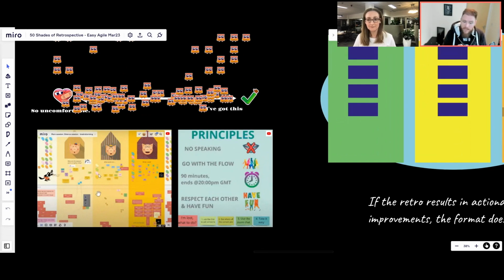Now, you can interact still. It doesn't mean that you can't get to the outcome of a retrospective. You can put Post-it notes on this board, and if you have a question, you might put it next to that Post-it note in a different color, asking for clarification. What I'm emphasizing here is that you can try embracing different styles of doing retrospectives by embracing the power of silence. Another tip is to wait 7 to 10 seconds before you speak after asking a question, because again, someone else will fill that silence themselves. So worth trying this. Give it a go if you feel safe to do so.